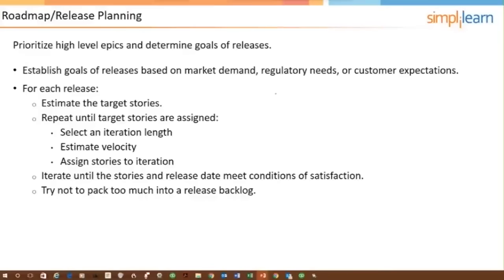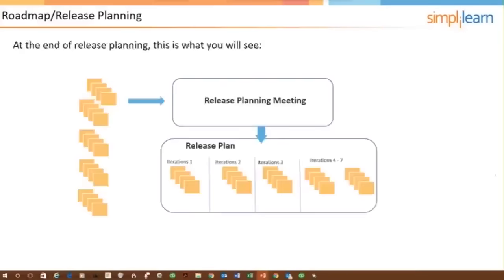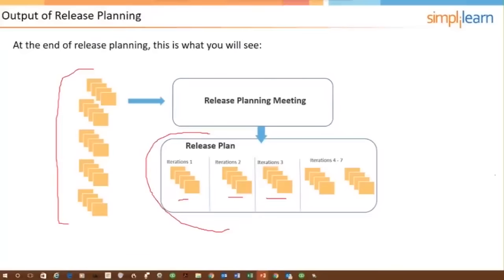Okay, so here's a bit more about release planning on this slide. You've got the product backlog here on the left, and then we might come up with a release plan, which could be flipped and looked at horizontally. And you probably plan about three releases in advance, or at least you're doing more of the detailed planning on that.